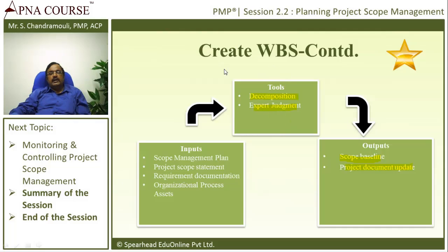So, input for creating WBS. The process of creating WBS is there in the scope management plan, right? After all, the project scope statement is what we are converting into the WBS. So the project scope statement is an input, and scope baseline is an output, and the project scope statement is being converted into the scope baseline